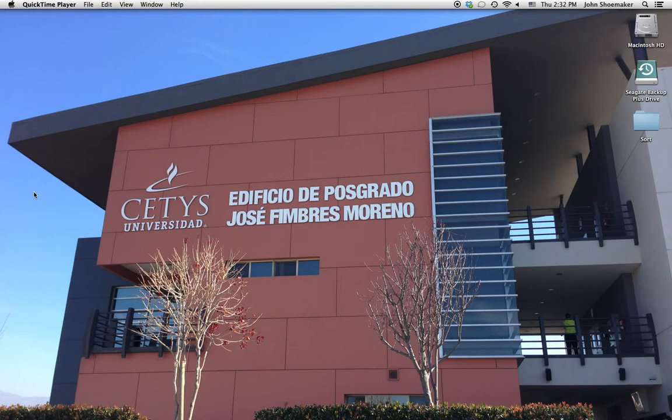But certainly we talked about cost when it got to the project charter, because no one's going to sign a project charter without knowing what the project is going to cost, or at least having a good estimate as to what the project is going to cost. Some project charter templates, including the one that we used for this course, may even require a high-level project budget as a part of the project charter.